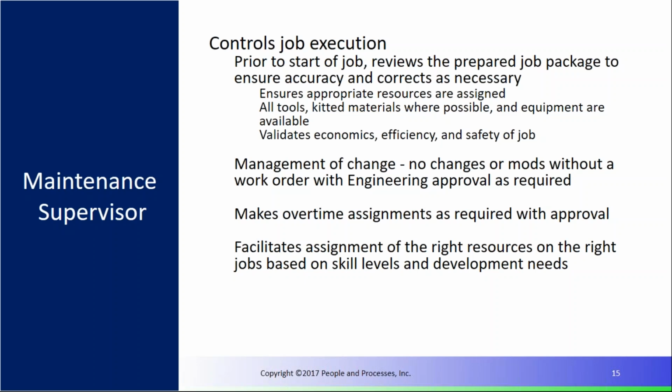And let me share this with you too. I see this happen all the time. If you are one of the organizations that assigns 30-day PMs in folders, and you give John, let's say, these 30-day PMs, and then you give Fred over here another set of 30-day PMs, sometimes John might, for example, take vacation, and you still need to get these jobs done. So I'm not a fan of doing that. I look for, let's have a weekly schedule and let's say where we're at on the weekly schedule. So basically every day, I want that supervisor to have already identified those names. But then if that individual calls in sick that day, then they need the flexibility to say, okay, hey, Fred, I need you to knock these out for me because they're a higher priority.